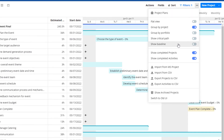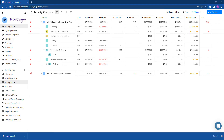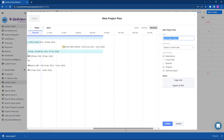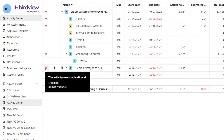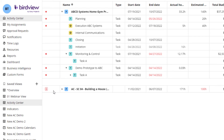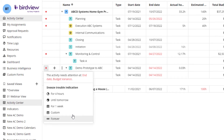In the Gantt view, you can visually see how you are trending from when the baseline was last captured. If you are required to share project progress with a client or other stakeholders, select project plan to capture a snapshot of key metrics like progress and dates based on the Gantt view. BirdView provides specific warnings to tasks or projects that are at risk or in trouble when tasks are overdue or when actual spend has exceeded the budget. Hovering over the indicators shows where attention is needed, and you can snooze these indicators by clicking and selecting a certain time period.